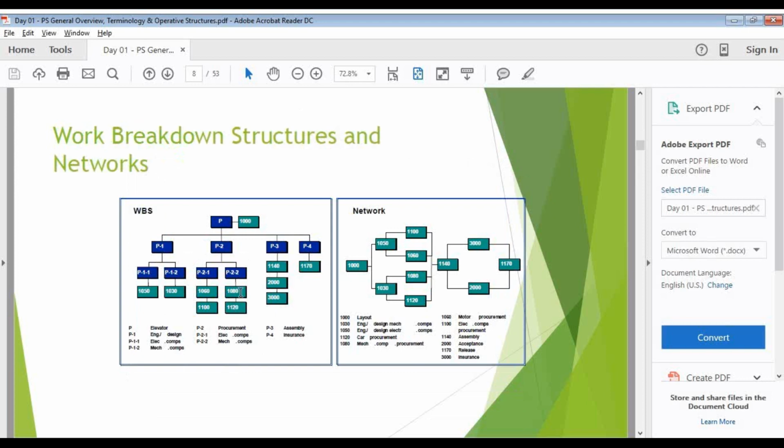That is why, technically, we will not be creating any network under WBS. We will be assigning or creating only activities. Once we save, the network will be created automatically. A network is only a header part. We can't say it is a dummy. It has its own value, but technically no data or no cost will be stored under network headers. All my data, the cost or everything, will be stored under network activities.